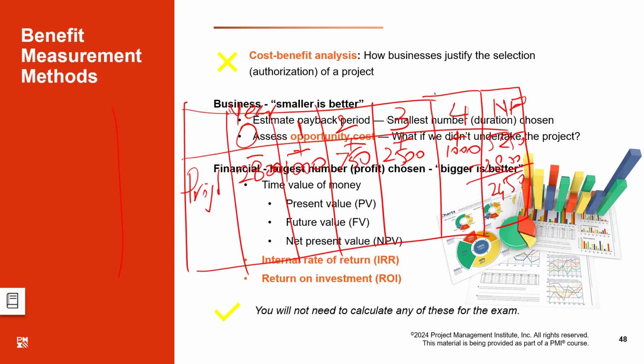And in the third year, you are getting 2,500. So that means somewhere in the beginning of the third year, you are going to break even, isn't it? Yeah. So payback period is the time when your investment will be realized. In this case, it is around 2.35 years. This is called payback period.